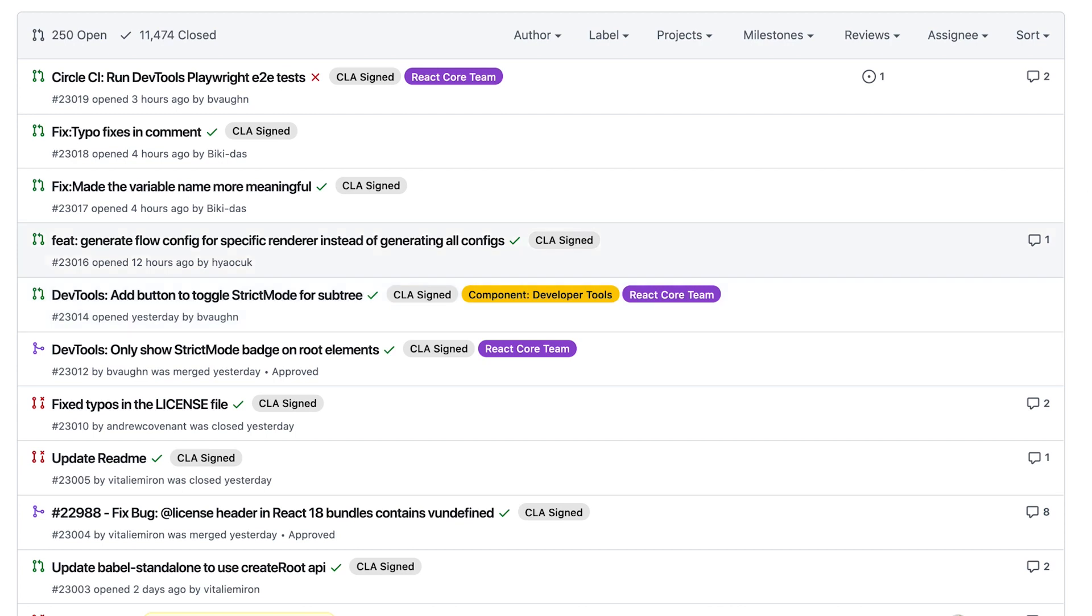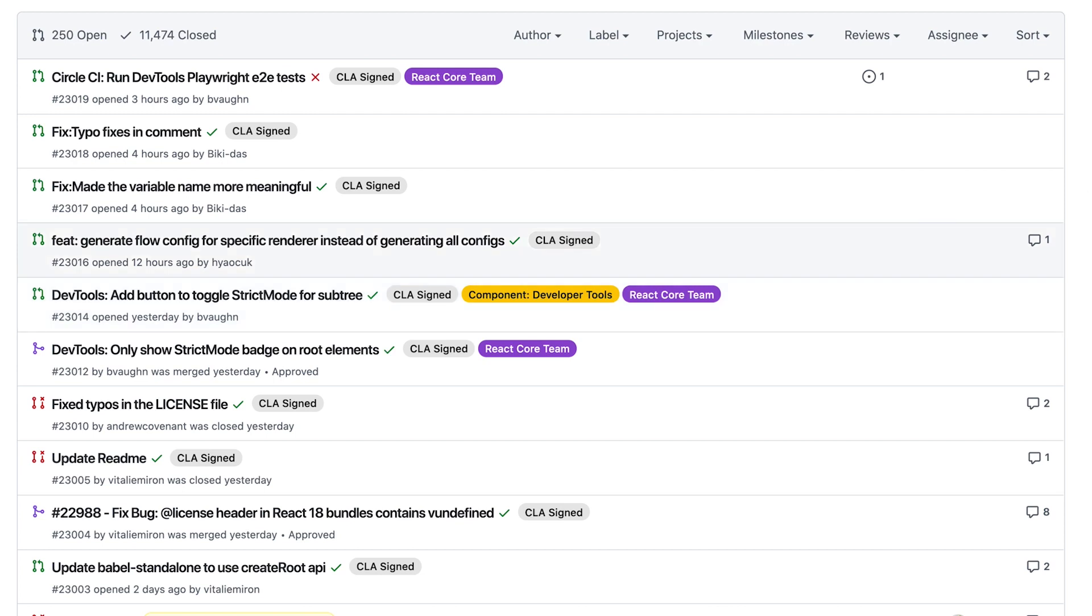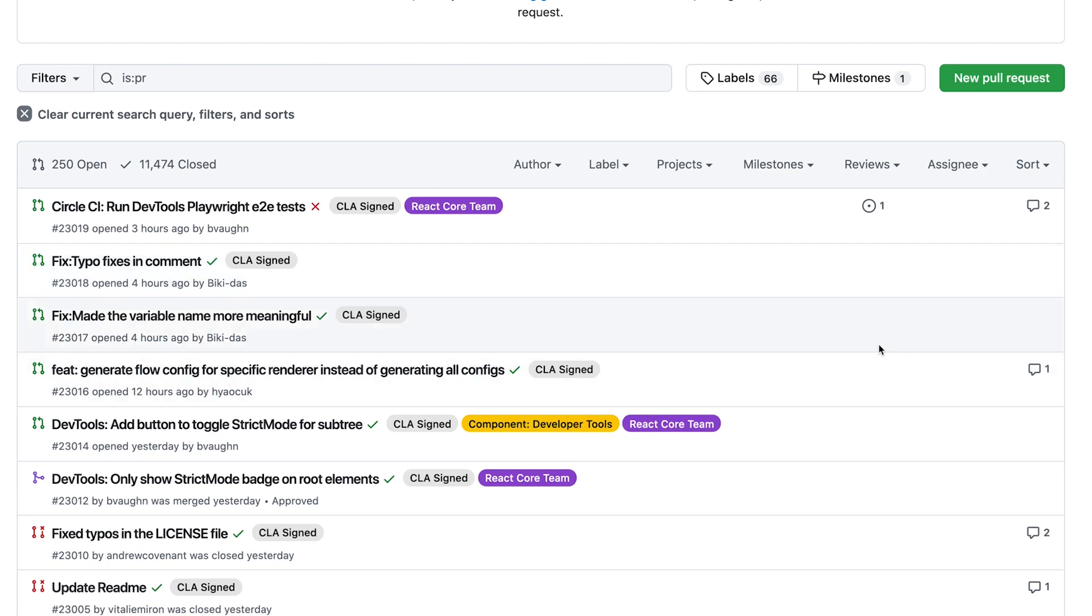Lean and Kanban methodologies tell us that the more work-in-progress we have, the slower we deliver. Work-in-progress is actually considered a type of waste since you're using resources but not yet delivering value to the customer. By selecting the PR status of Open, you can look at in-flight work and examine it for hidden blockers.